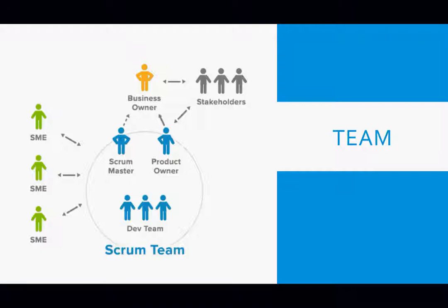So in the grooming session, you can estimate. You as a QA will look at the story and say this story is 2 points, and a developer can look at it and say this story is 5 points. Another person can look at it and say this story is maybe 8 points. So you deliberate on the point system.